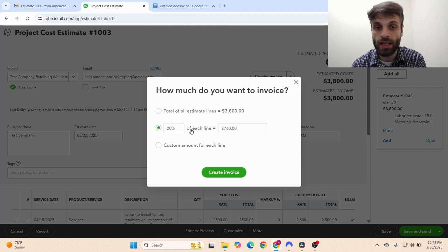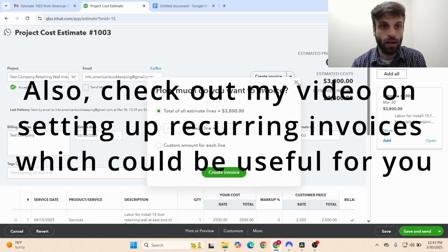So when we send this new invoice due on today, we can set the due date and we can set a percentage due on that monthly invoicing at a certain percentage of the total. So we'll show you how to set that up in just a minute.